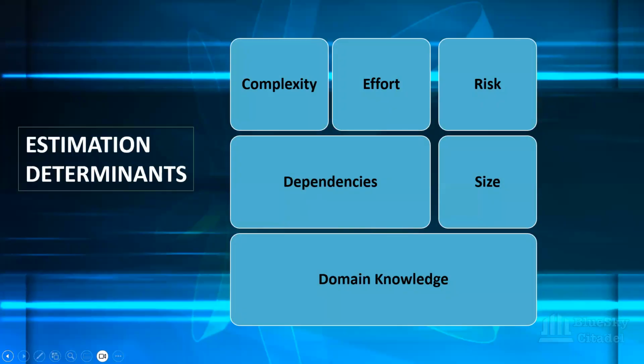Bear with me. Okay, so under complexity, this is a key factor during story estimation. If a user story is more complex, it's likely to require more effort to complete it, and therefore may be assigned a higher story point value. When you're looking at complexity, you're looking at situations where some investigation needs to be carried out, mainly on the developer's environment, and even the testers might need to do it. So it's something technical for them to do.